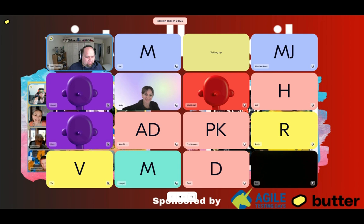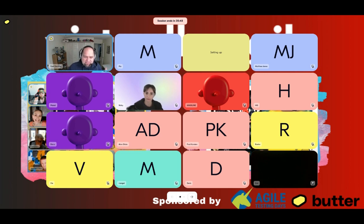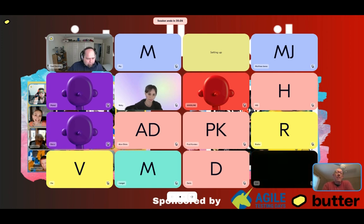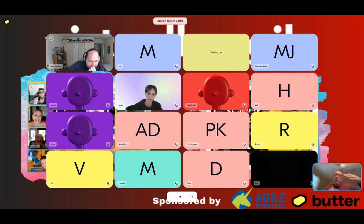One thing I liked — the last couple of slides, Mark — how do you take your existing tooling in Jira where you see that burndown chart, which really just shows when things are getting done, and bring that whole story to the team? And I guess one of the big things is to take this information to the team — it's not up to us to decide how the team works. A hundred percent. Show them. The beauty of understanding your flow, and then having a nice graph to show it, is it gives such deeper insight as to how they're actually working. If you're noticing things getting wider, maybe that's a bottleneck — you can't get that with a burndown only.